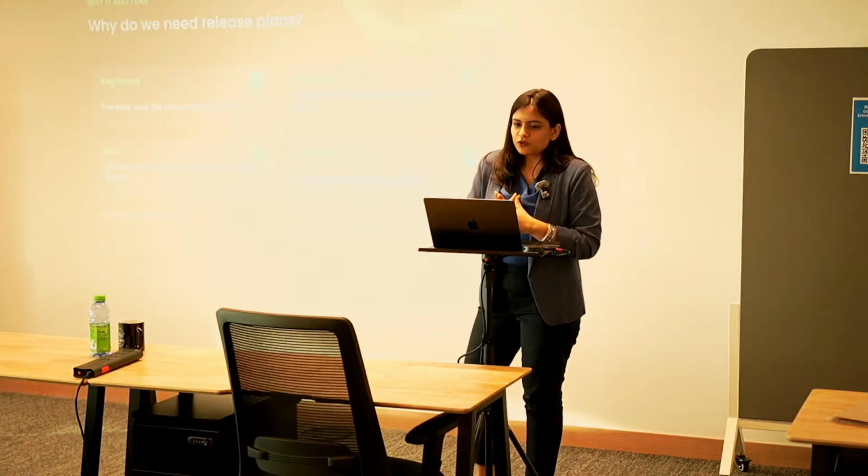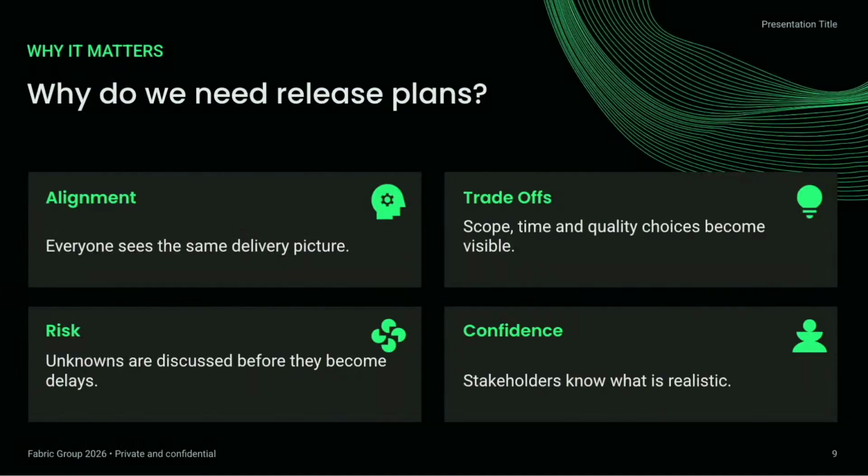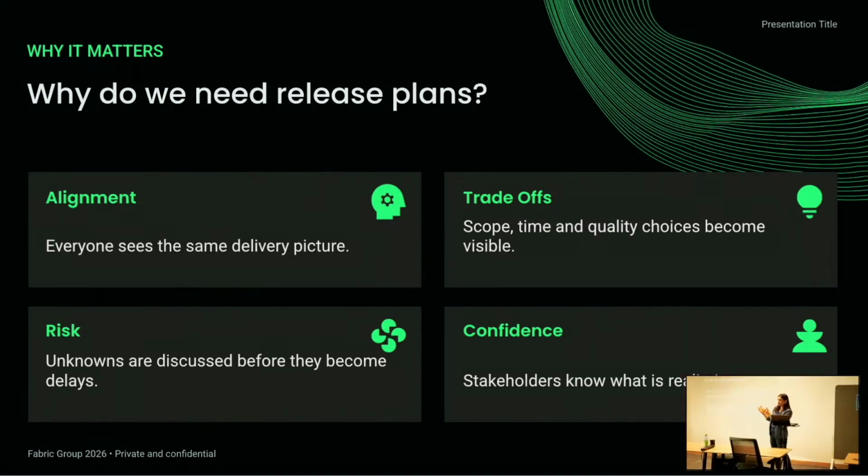All right, moving on to why do we need release plans and why is it important? They are valuable because they help create a shared agreement and alignment with the clients as to, okay, this is the scope that we're trying to build, and this is the scope of work. Usually, that's where I see most of the misalignment, where we are not able to meet that. The reason being there are scope creeps that we identify, there are dependencies that we are not able to understand at the very beginning, and there are also risks that we don't bake into the plans.